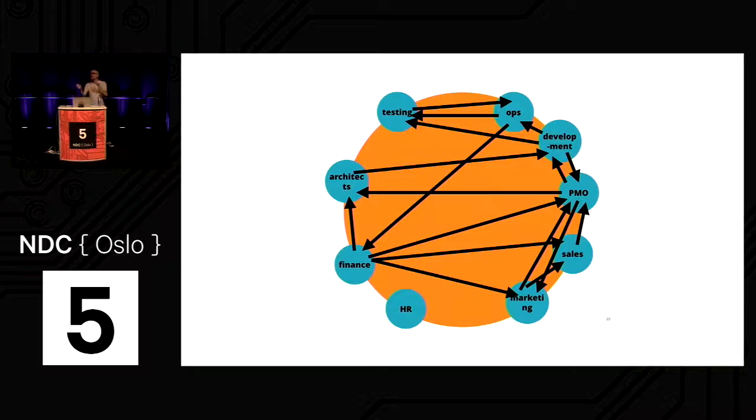It then gets handed over to testing. Testers do some testing. That's kind of what testers do. And then throw it back because of bugs, defects, and you never thought about this, and the users don't like it anyway. And it goes back and forth, until eventually it goes into the queue to be deployed into production. And that queue is a release train that takes 26 weeks. So you wait another 26 weeks, at which point you've lost all that money that you could have had if you'd optimized your process. That's kind of what these chords represent, work being handed off between different groups in an organization.